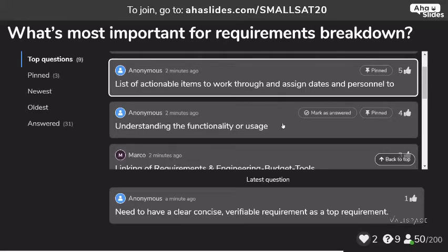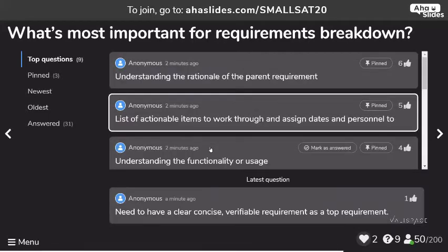Especially from a radiation perspective, you're going to get requirements that could have very large factors of difference between them. So just doing a standard value in a database is not always the best approach. And then this also flows out into creating a reasonable approach for how long it would take you to get that information, and then which personnel you're going to use for it.